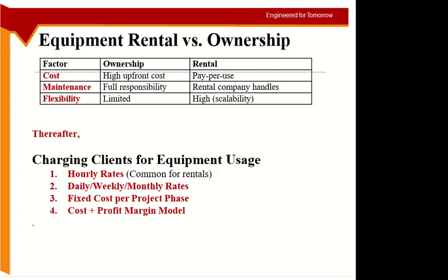So in one project I need a small excavator, and in the other project I need a big excavator, so I don't have to think about whether I should use it or not. I will rent a bigger one. But in ownership, obviously you have what you have. If you have a small one, you will try to use it. So in terms of time, the ownership will give you greater flexibility, but in terms of size, you get more flexibility when you're renting the equipment.